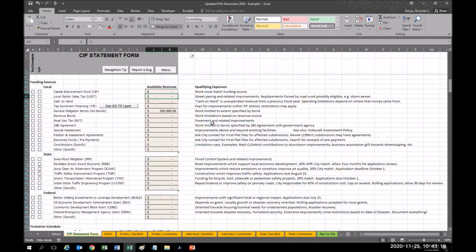come up and is included in a 5-year plan, at least in a budget submission from a year or two ago. So ask your city project manager and see what they plugged in for that budgetary figure. It's not a commitment, but it's just kind of maybe an expectation for how much they thought they would be able to commit to this project. So whatever the funding sources are applicable, check mark yes or complete for what you think will be used. And you can mark as non-applicable ones that you know for sure that you're not going to be getting. So we're not going to get any RUT for this project, so we'll mark it as NA, no escrowed funds.